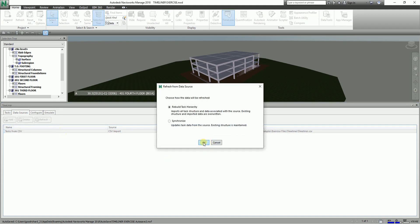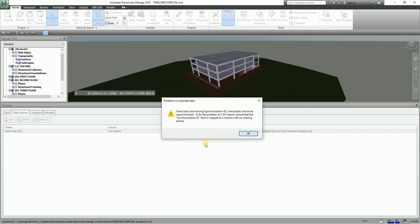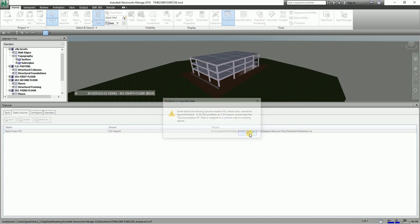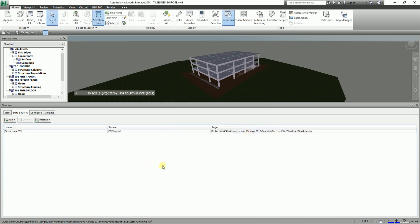And then after that just select OK. So reveal task hierarchy - it imports all task structure and data associated with the source. So I'll just select here OK. All right, just select OK here, it's fine.